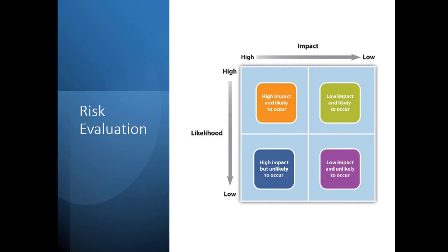Same thing happens in new building construction. If you're working in something like a hospital, there's a lot of regulations, so the risks associated with a hospital job are going to be much, much higher, because obviously it's going to have an impact on the end user, which will be patients, than something like a home design, where it's pretty straightforward. The building codes are quite clear. Something like a hospital, there's a lot more regulations involved, which means the complexity is going to be a lot more difficult, which usually means the risks are going to be higher to get it right.